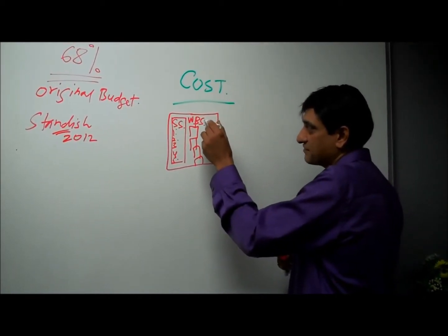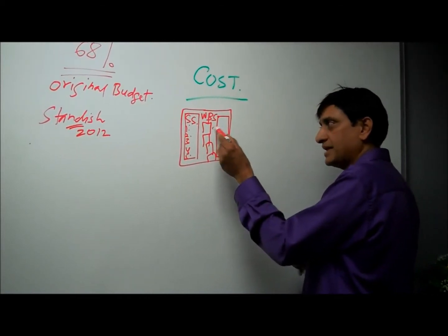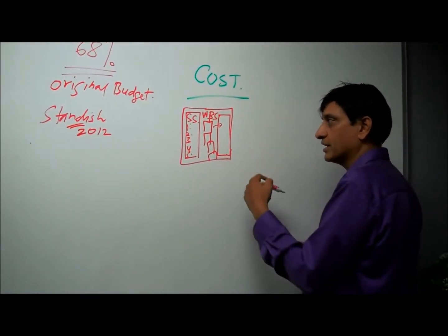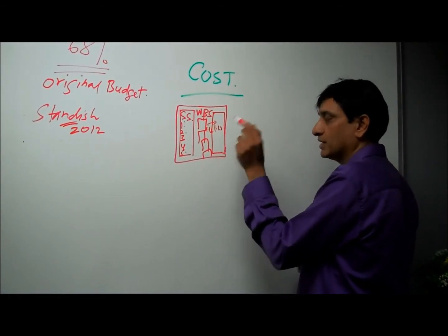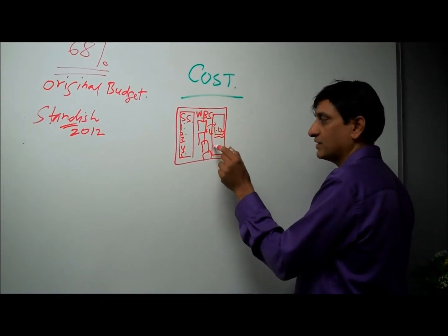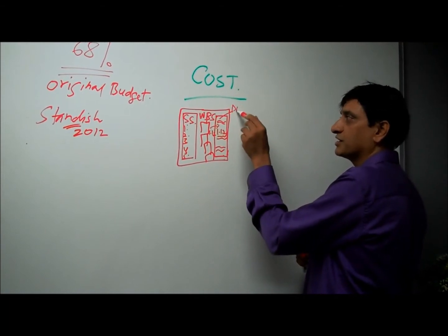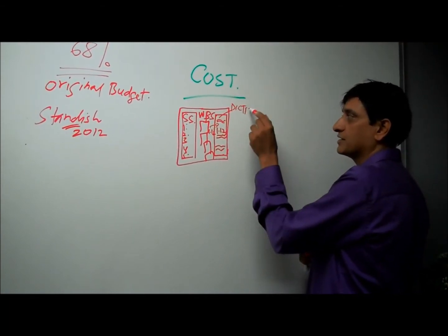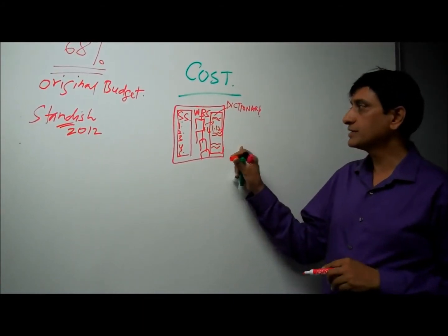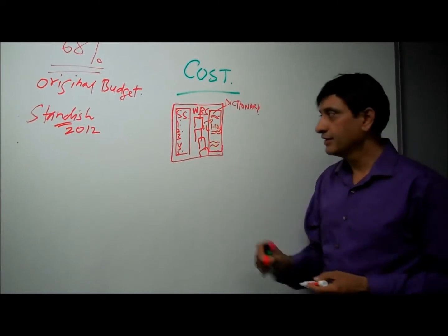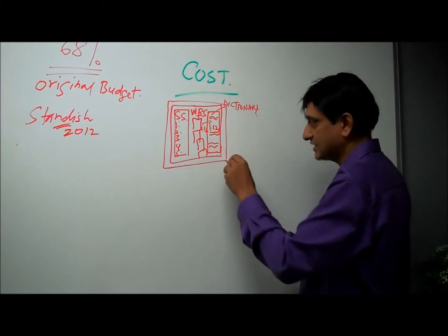And then we have a third document which explains the components of this WBS in greater detail. For example, if this is 1.1.2, what does that 1.1.2 mean? What is the description? So it explains. Likewise, other items. This is what we call a WBS dictionary. With the WBS dictionary, we get the details about what is in here. And then all this, friends, is signed and approved by the stakeholders.